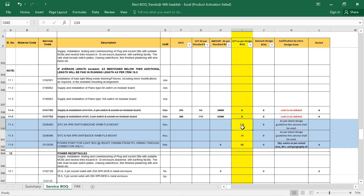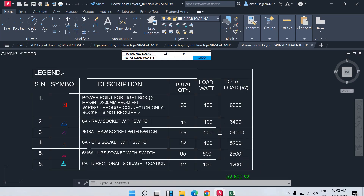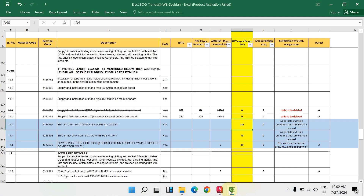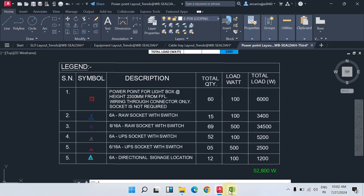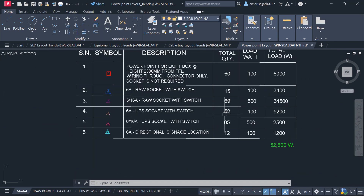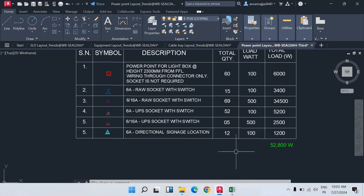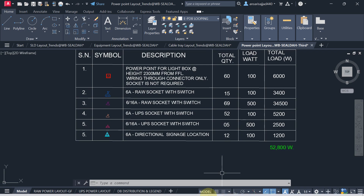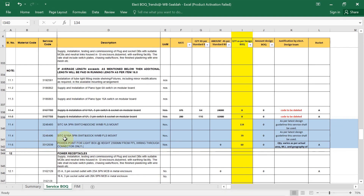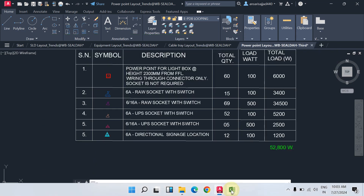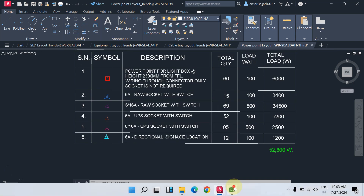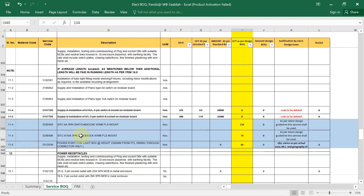For 6-amp 3-pin switch and socket, the quantity is 134 — open the power point layout and count to verify: it is 134. For 6/16-amp 5-pin switch and socket: 15 plus 52 plus others — the BOQ shows 79. Note: check the exact type of socket in your project as the quantity shown may not be precise.